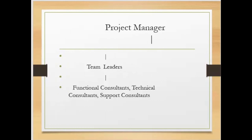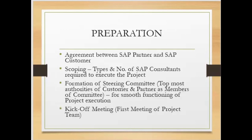Before the ASAP methodology starts, there are pre-sale and sale processes where the project is captured. Once the project is awarded to a company, the real ASAP methodology begins with an agreement between the SAP partner and SAP customer. From there, the first step — called scoping — begins. Scoping means defining exactly what we are going to deliver in this project or time period.